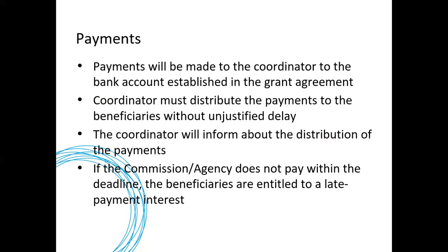This is some information which I have already mentioned. The coordinator has to distribute the payment to the beneficiary without unjustified delay, and he or she may also be required to inform the Commission about the distribution of the payment, of course, the distribution which was made to the beneficiary. So if the Commission does not pay within the deadline, then the coordinator and the beneficiaries can be entitled to late payment interest. But normally all payments are done in time.